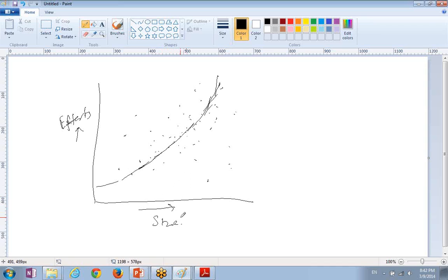The increase in the effort is a little exponential as such. So if this is S and this is E, you will come out with S equal to some function of E. Based on this, if a new project comes, it's the opposite way, because we normally calculate efforts. Effort is equal to a function of size. And I know the size of the new project, so I can guess efforts based on this formula. This is called regression analysis.